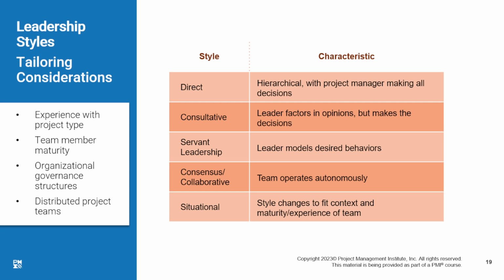There is what we call the direct or autocratic leadership style, where you are the one making all the decisions. Everything has to pass from you. Yes, you can get things done quickly. Especially in an emergency, this works very well. But boy, it stifles creativity. It makes people have a bad impression about you.